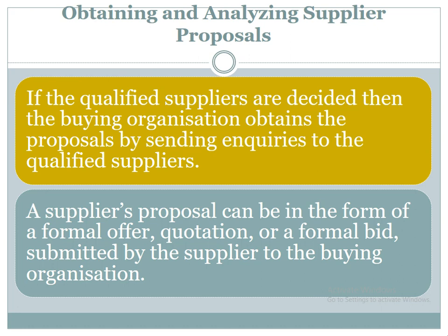For technically complex products and services, a lot of time is spent in analyzing the proposals in terms of comparison between the products and services, maybe comparison between the deliveries and landed cost, which includes the price after discount plus excise duties if they are applicable, then sales tax, then freight and insurance, and so on.